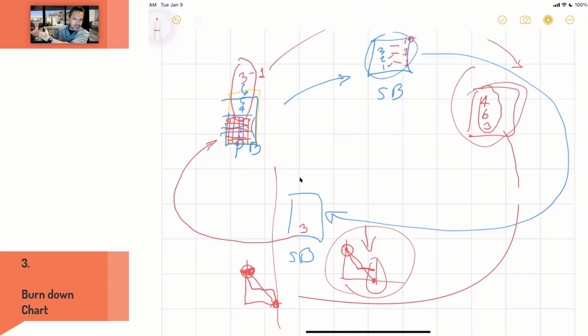So even though after the exam you learn the concept, you receive a low grade in the exam. So here with the sprint, you didn't finish the 3. The picture in your burndown chart represents this space, this gap, that you didn't finish the 3. We put the 3 back in the product backlog because somehow we need to do that 3 in a future iteration. Make sense? So even though you move the 3 to the product backlog, that doesn't mean that you put here a connection with the 0, because that is not true. You didn't finish.